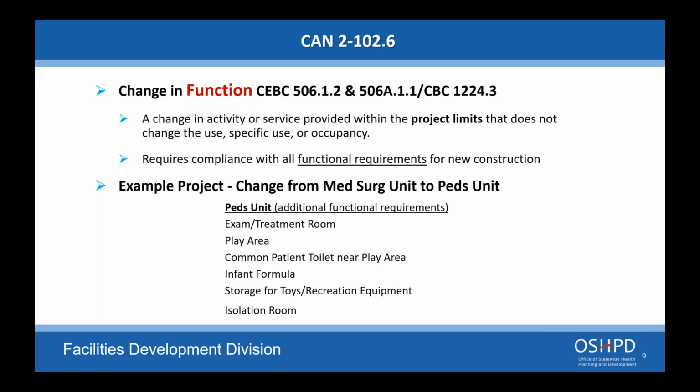And a lot of these are being reviewed in the field, so they're pretty quick. We're looking at what equipment's being removed, reinstalled, re-anchored, slopes of roofs, things like that. So there are a lot of things that are involved in that. But they are typically reviewed in the field.